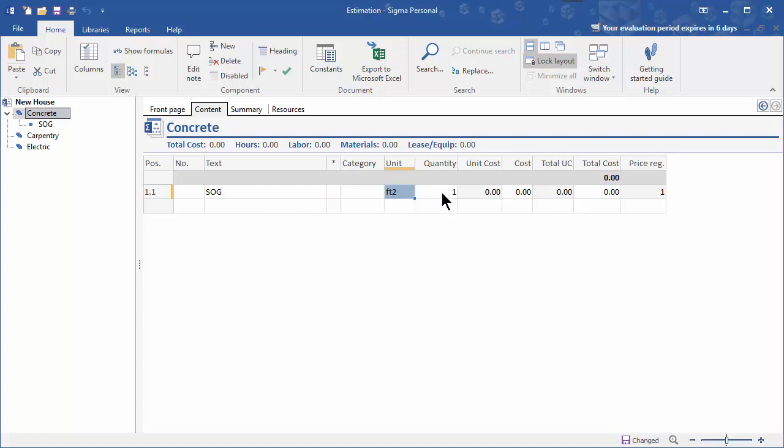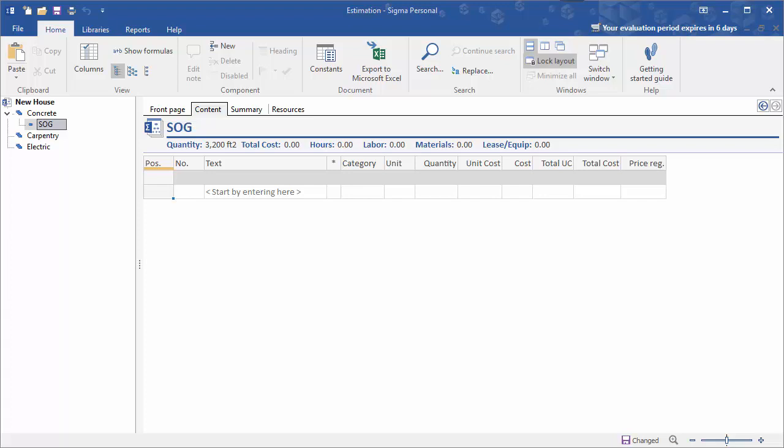Now keep in mind that whenever you add a component it defaults to a quantity of 1. So let's add 3200. So we've just added a 3200 square foot slab on grade as a component in the concrete.